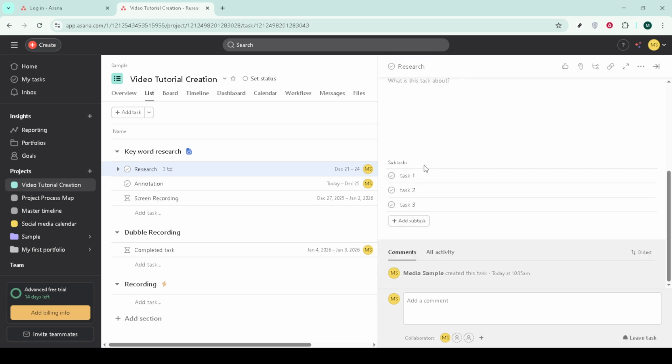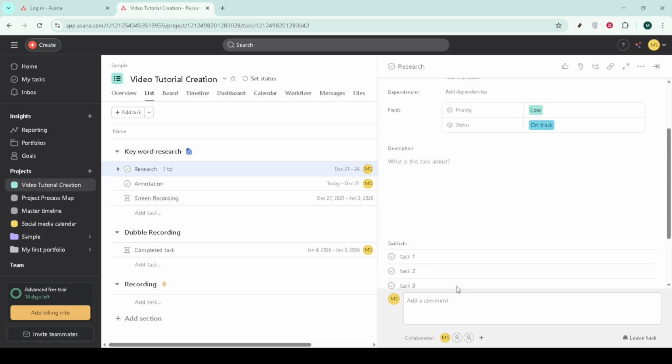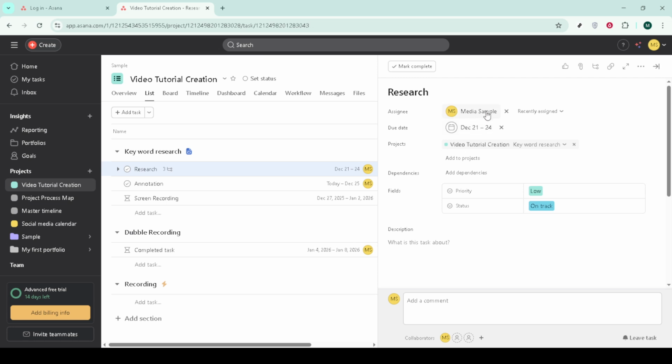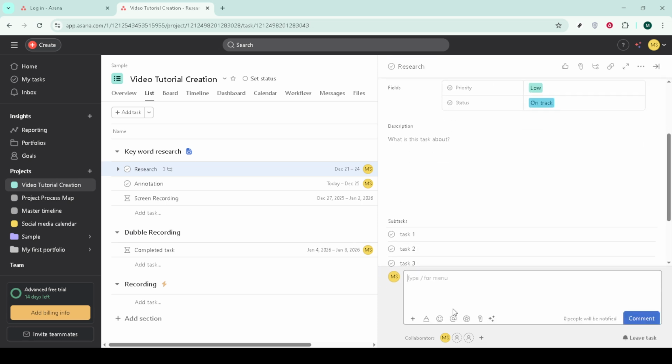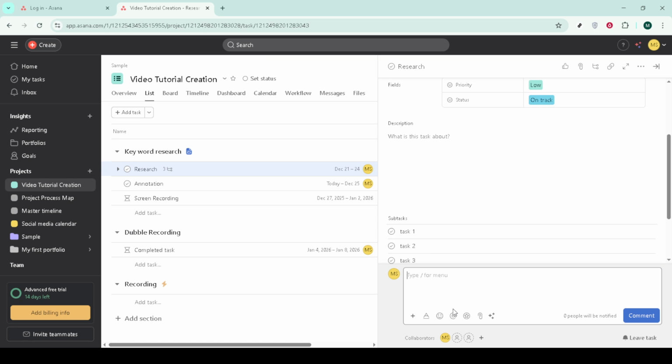Assign each task to exactly one owner to keep accountability crystal clear, and add collaborators for anyone who needs to follow along. Set due dates to keep momentum, and add start dates when timing matters. Use tags or custom fields to prioritize, such as high, medium, or low, and to capture details like channel, effort, or status. Keep these fields focused so your team isn't overwhelmed.